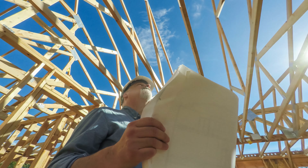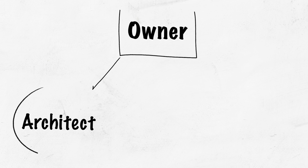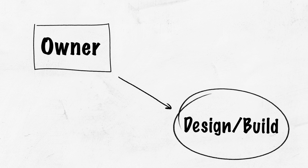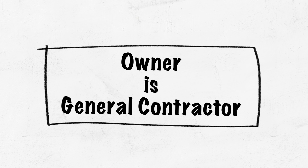We're going to go over how to hire a contractor and by what method. There are three types of arrangements in going about constructing your project. Those three arrangements are: hiring an architect and then hiring a contractor independent of that architect; second, hiring a design-build team where the architect and the construction company are merged as one; and third, the homeowner or business owner serving as the general contractor.